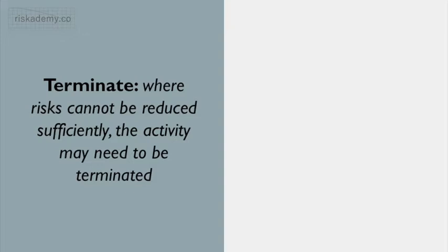The final option might be to terminate an activity where risks cannot be reduced to an acceptable level. This is not the same as avoiding the risk, where the activity continues under different, more acceptable circumstances. Terminate means that the activity must end completely.